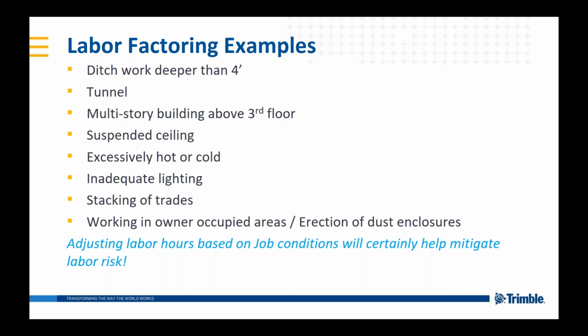Working in excessively hot or cold areas, obviously, is where we touched on that one. We would apply a factor for that. Inadequate lighting, stacking of trades. You're in a very small area, all the trades are in there working. That's going to impact your labor. Working in owner-occupied areas and having to erect dust enclosures also would impact your labor. So adjusting those labor hours based on those job conditions will certainly help mitigate any of your labor risk.